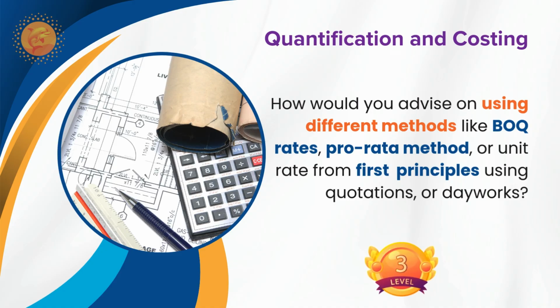And if it is a totally new item, then I will take the rates derived from first principles, or from the building cost information system or building maintenance index. From that I will refer. Okay, fair enough. Anybody wants to add something or change the way of answering?